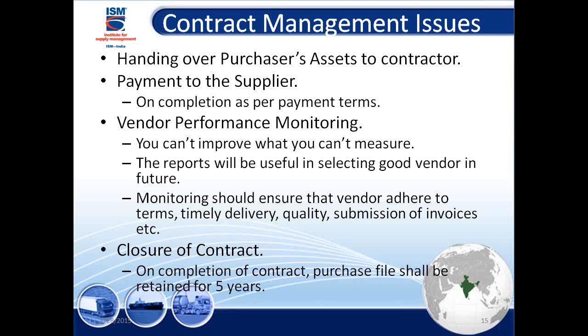As we said earlier, vendor performance monitoring is very important. How do you check vendor performance? In terms of quality, deliveries, quantity, after-sales service, installation and commissioning. You really need to record them and give them a score based on that, on a scale of 1 to 5: where do you rate them? So the rating has to be done, monitoring has to be done, so that the next time you deal with those people who are rated very low, you may not even use them. Or if the performance was really bad, you may like to blacklist them. So this is where vendor performance monitoring has to be there.